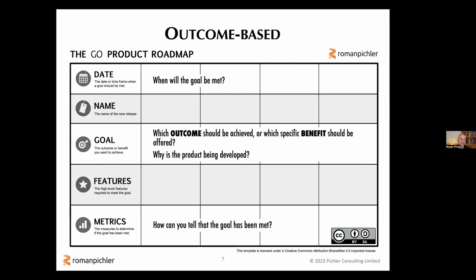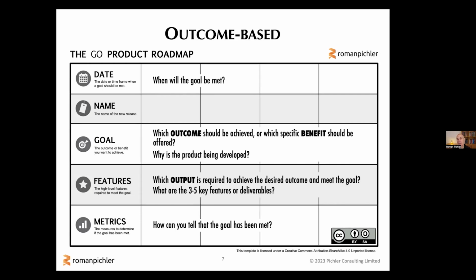It's great to have a big aspirational vision that acts as the true north and offers some fundamental alignment. But when we set goals on a product roadmap, these goals should be specific, they should be detailed, and ideally, they're measurable. And so it can be useful, I find, to add metrics, add measurements to a roadmap to ensure that the goals are effective. And then, as you can see, I still like to add some features to a goal-oriented roadmap.